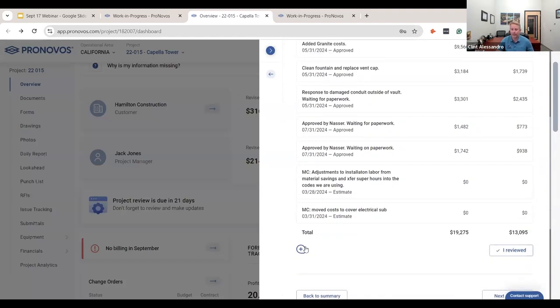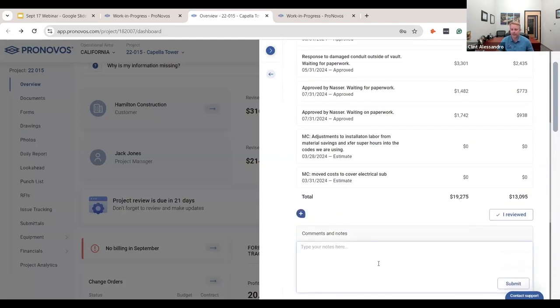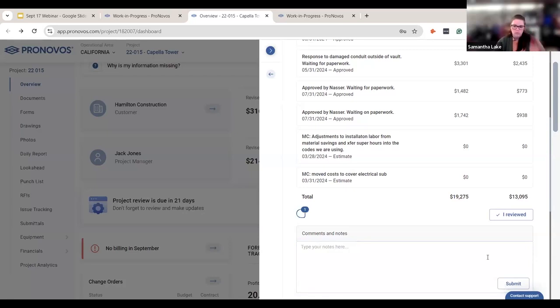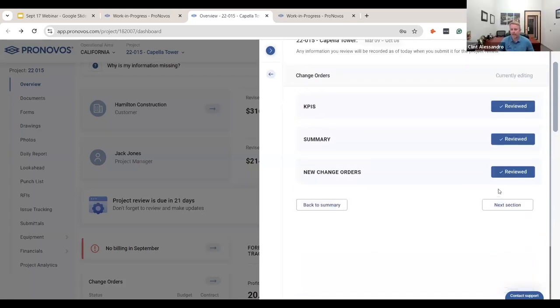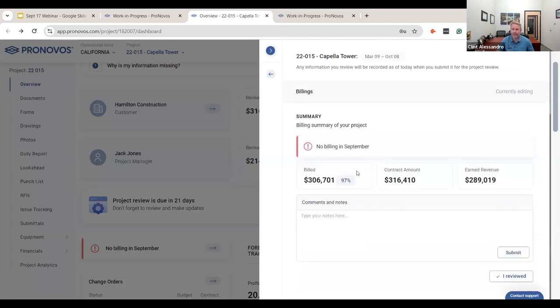Because in my mind, the way I review this flow is these are all part of the same thing. Once you get your head into the project and you're looking at the cost and you're projecting the cost, you know what your cost is for the month. So at that point, you're ready to do your billings at the same time. And then as you're reviewing all this, we have our project managers calculate their over under billings, and we have them tell the CFO, hey, this is how much we're billing for the month, and here's how we project our over under billings to be at the end of the month. And if they have concern that they're going to be underbilled, then they can also put in a comment.